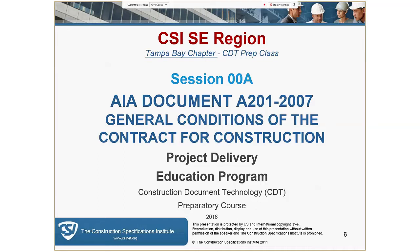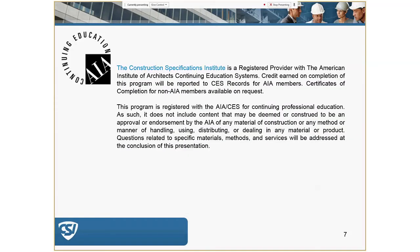Two terms to keep in mind: general conditions versus general requirements. General conditions is a Division Zero document — it talks about the general conditions of the contract for construction. General requirements are the administrative portions of the specifications, typically referred to as Division One, which we'll cover at a later date. Keep in mind that general conditions is considered the five-star general. This course is approved for AIA CEU units.